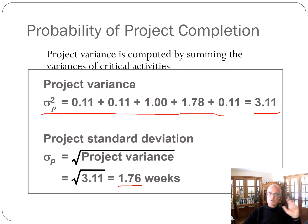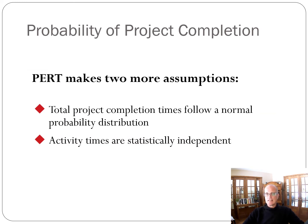So then, we've drawn the network, we've figured out the project variance, now we can start looking at how to do these calculations. PERT makes two more assumptions that I think are worth knowing. These often show up as multiple choice questions on exams, but not usually on an assignment. These are good things to know, and I would review them in the textbook. Total project completion times follow a normal probability distribution, and activity times are statistically independent. That means that the completion time of this activity is completely independent of the completion time of this activity.